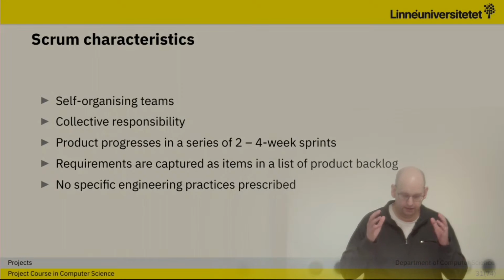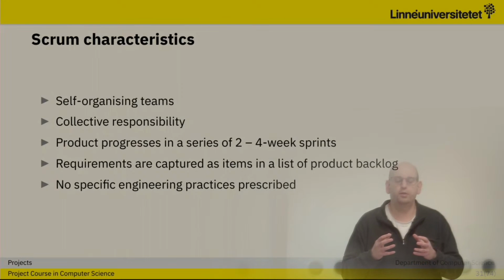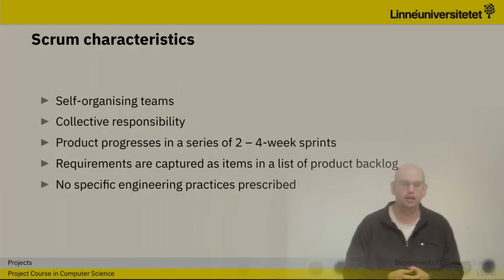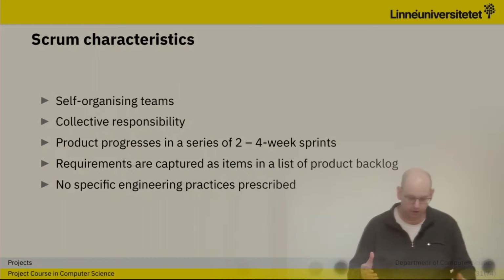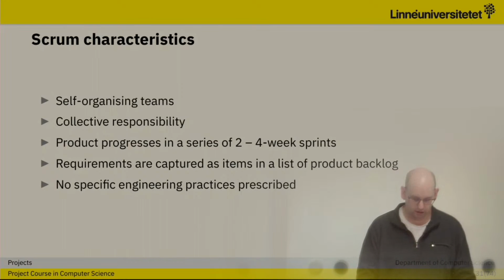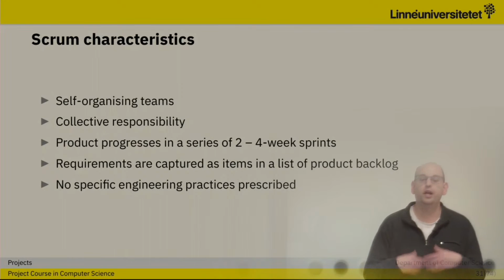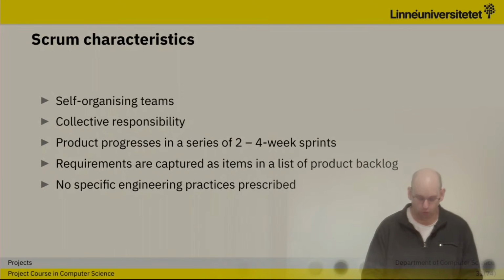And the idea is to work in sprints so that we can have communication with the client and the product owner and so on, and get feedback on the stuff that we are doing. And requirements are captured as items in a list in a product backlog, and from this we pick the ones that we are able to do in a specific sprint, and then we just work with that.